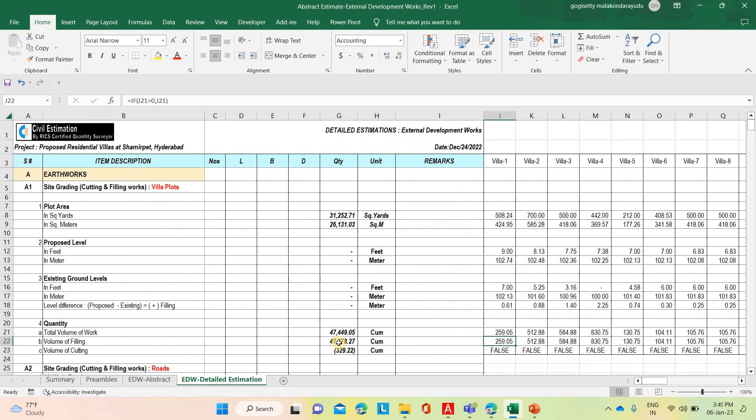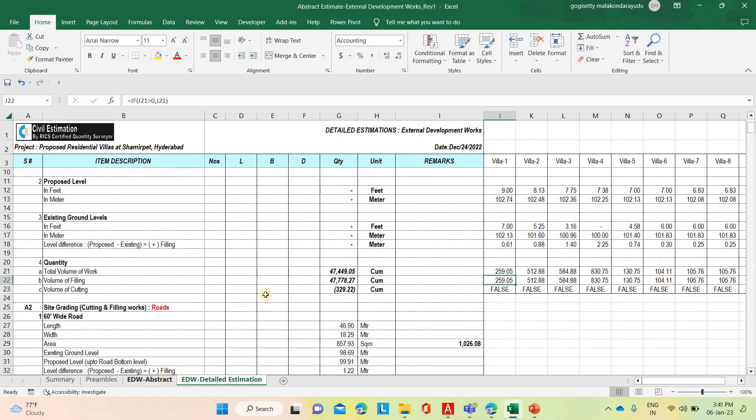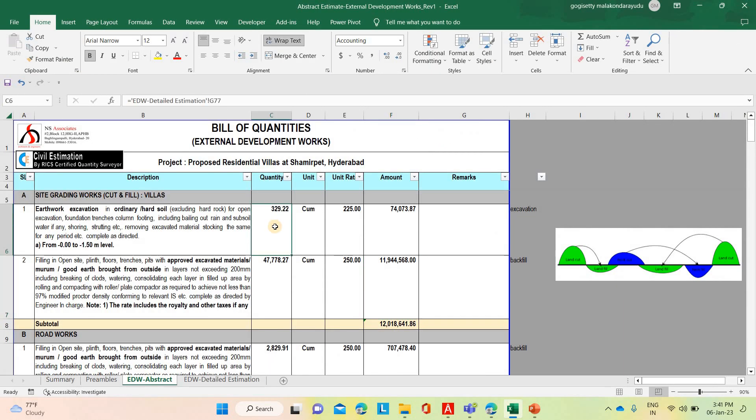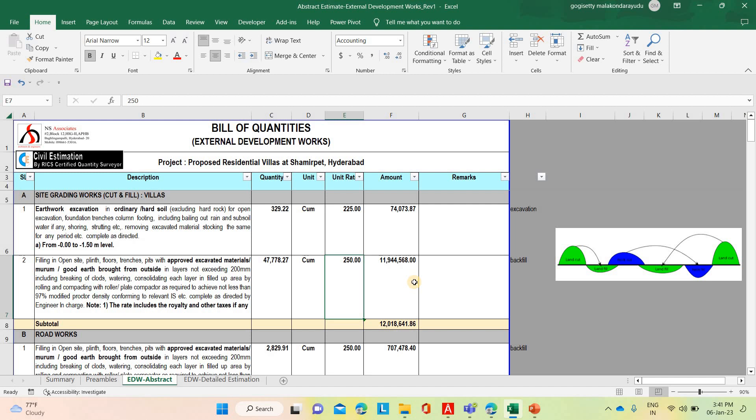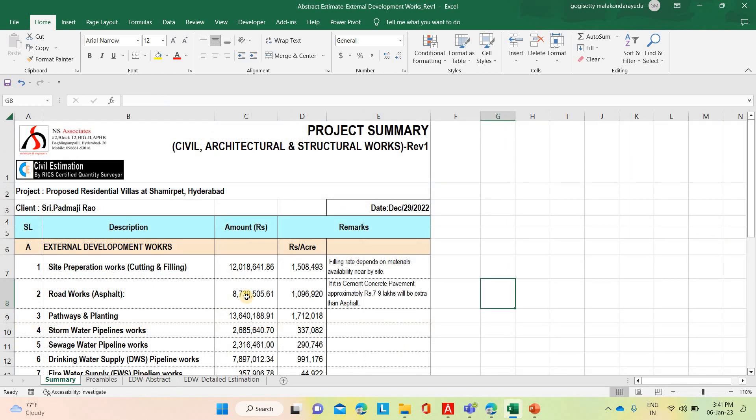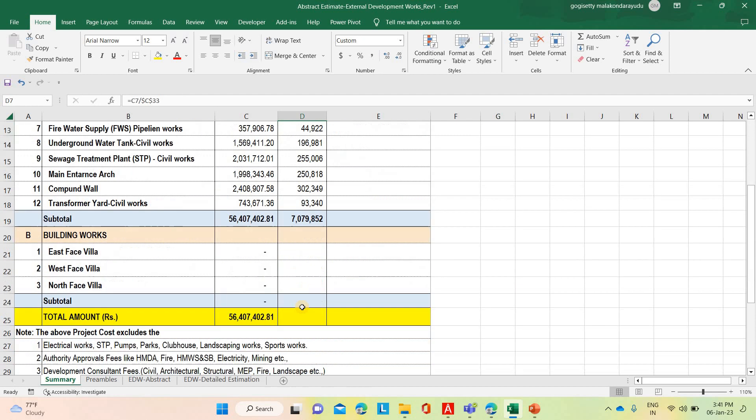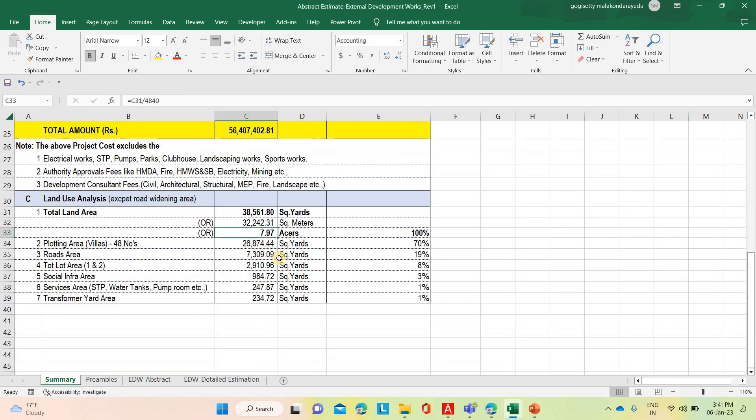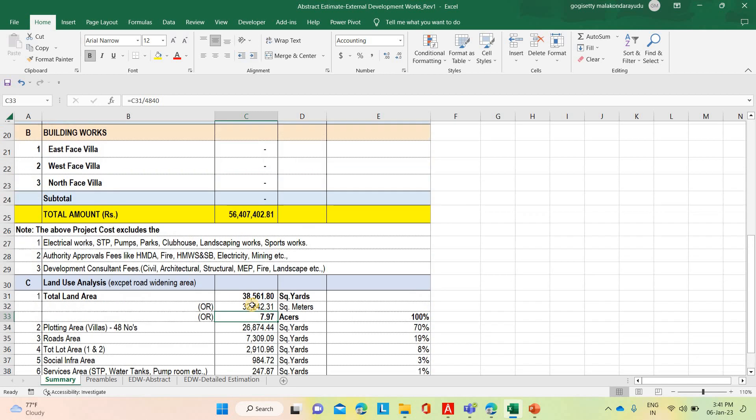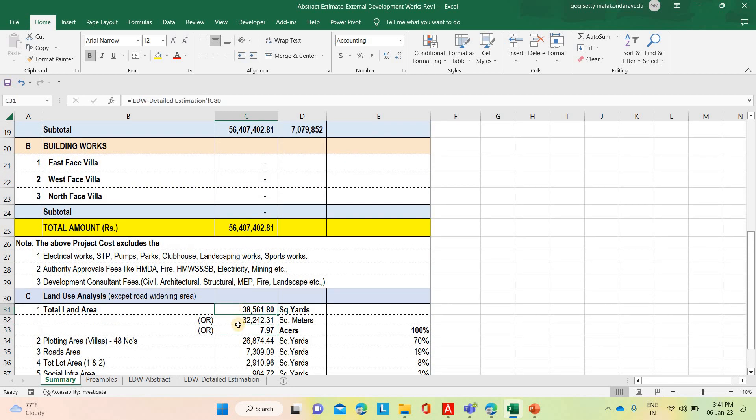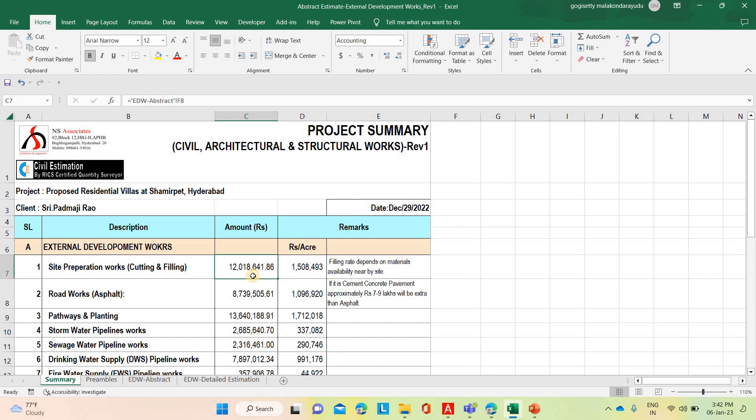For the villas area, plotting area for this, total 48 villas. The total is 8 acres land development. For the villas, cutting is 329 cubic meter and filling is 47,778 cubic meter. Based on the current rates in the Hyderabad, the Shamirpet area, 225 rupees is the excavation rate and 250 is the filling rate. In this nearby site, the building borrow area is there, so we have considered that the filling material will get from nearby site. The total is coming 1 crore 20 lakh 18,614. Per acre it is coming, this is almost 8 acres land development, 38,561 square yards or 32,242 square meters or 7.97 almost 8 acres land. This is 1 crore 20 lakh 18,640 for the site preparation works of the cut and filling. It comes to per acre of 15 lakh 91,493.